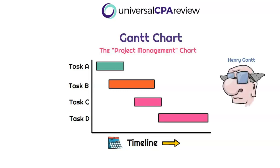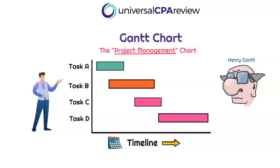A Gantt chart, created by Henry Gantt, is primarily focused on project management. On the Y-axis we have the various tasks, and going across are horizontal bars representing the start date, end date, and duration of each activity. We can see task A starts first, task B starts partway through task A's timeline, and then C and D follow. This allows the whole team to be aligned on what tasks need to be performed, when they start, when they end, and their duration.